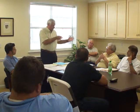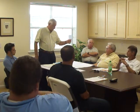The sub works for the GC, and he has a legal contract with him, just as you do across the building industry, with GCs and subs. Over here, we have components. They have a direct contract with the Valdosta Housing Authority to perform that portion of the work. And of course, they have a responsibility in that. They have to work within the time frame, but their pay request will come to us, just like your pay request would come to us, and include any subs that you have.